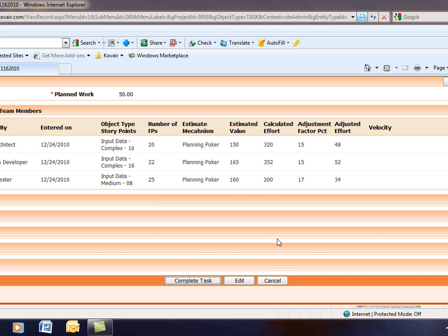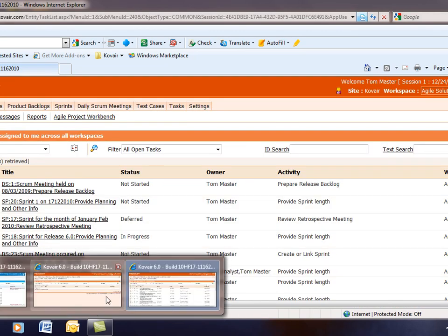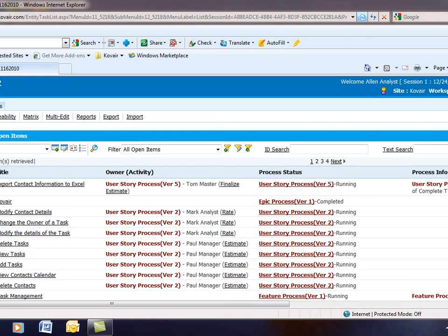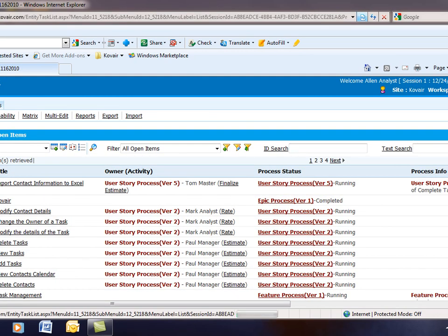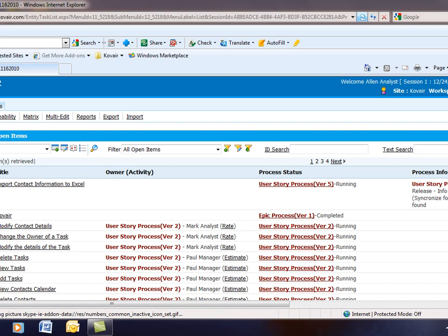Now at this level, the product backlog process stops, or it's paused for certain other actions to be done in the different phase of this project. So let's say at this stage, the process for the product backlog keeps waiting until, in a Scrum, it's decided what the sprints or the release backlog would be, what are the sprints that will be assigned to that particular release, and which are the backlog items that would be worked on in the sprints.